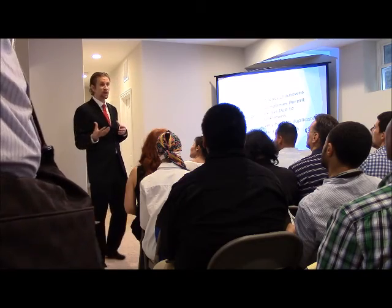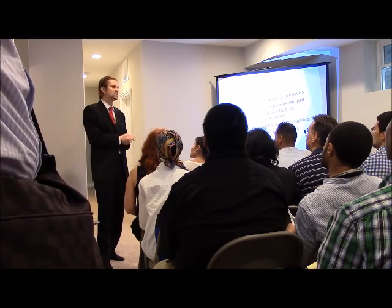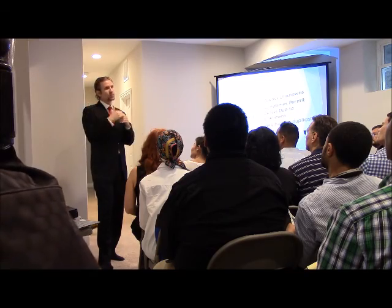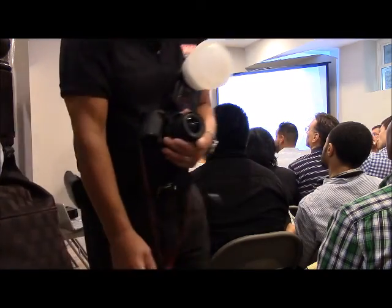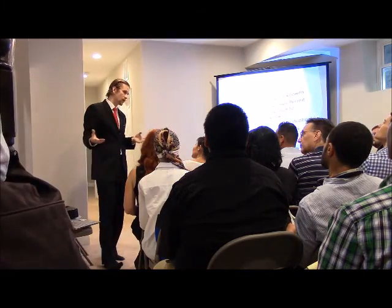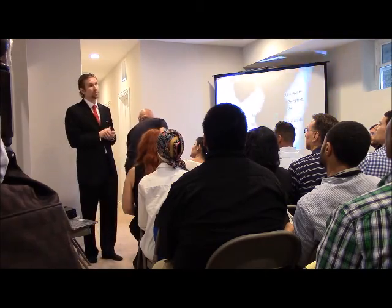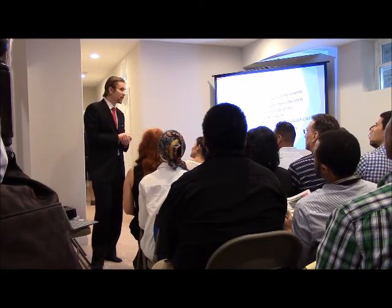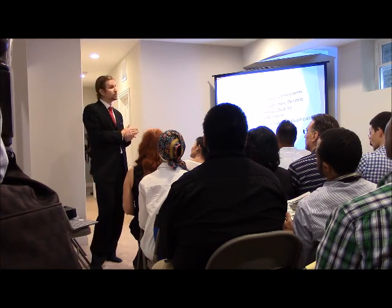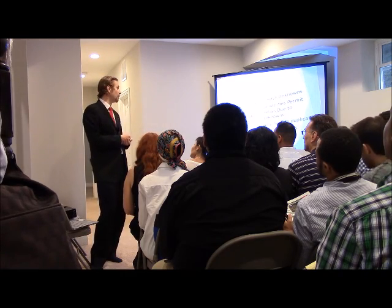Sometimes you may have a permit, and then you may have to reapply if they come in. For example, we did a gut rehab house with no attic access whatsoever, so we had no way to inspect the attic before we bought it. Come to find out, the owners failed to mention that they had a fire in the home. When the city came in, they said you have to replace the wood, and you also have to reapply for the permit. Because that wasn't on the plans, that alone was a 3-month delay, not because of construction, but because of the permit. Those types of things can happen when you do rehabbing.